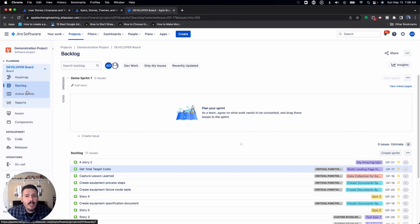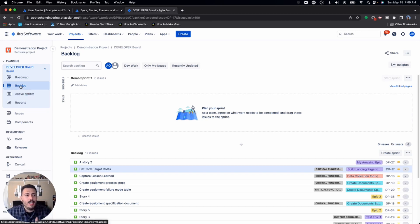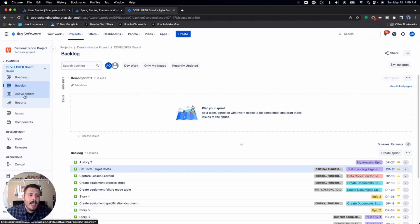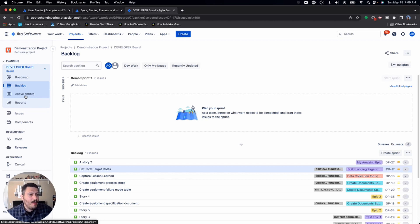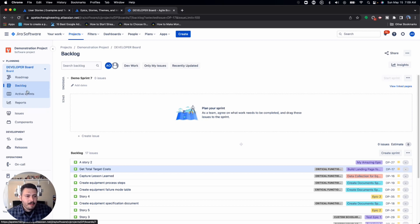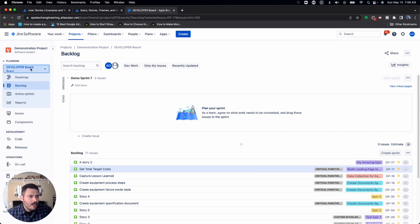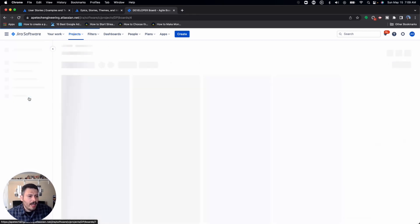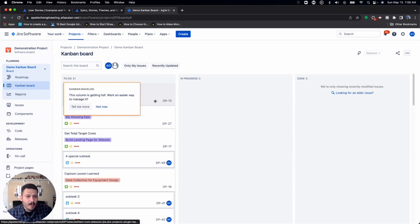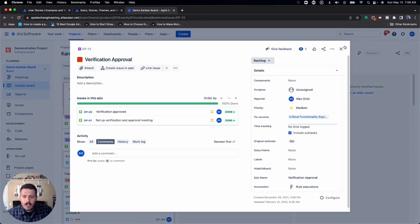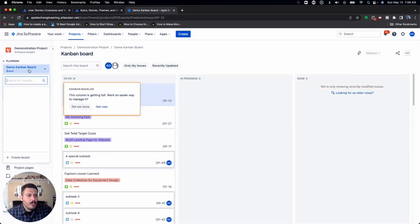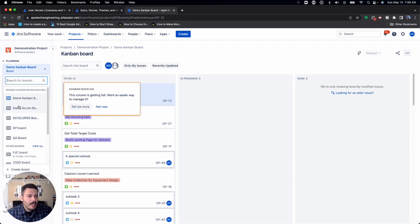The easiest way to tell if you're in a scrum type board is A, you're going to have a backlog by default, and B, it's going to have active sprints here. So if it doesn't say active sprints, maybe you're in a business type project, maybe you're in a team managed project, maybe you're just in a Kanban. And so you're going to want to make sure that you are in the right type of project.